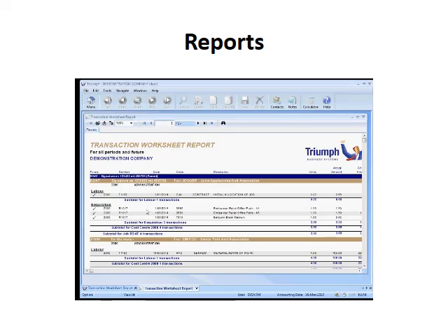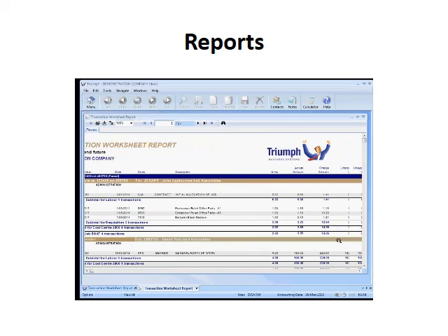This one's now giving it, breaking a similar sort of information but breaking it into the labour requisitions and the type of time you've done, with the same sort of concept, so people can come through and say how much was unapplied work in progress and what should be billed. The general concept of both of those two reports is really about letting foremen have a look at the job, work out what they should be billing, then passing that through to the person who's going to do the invoicing.